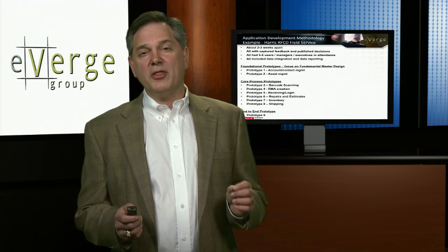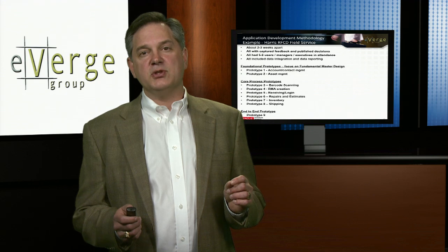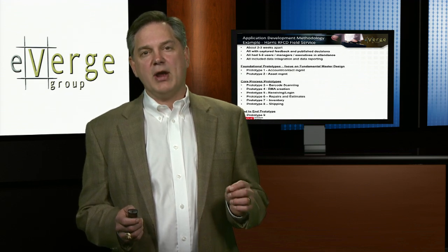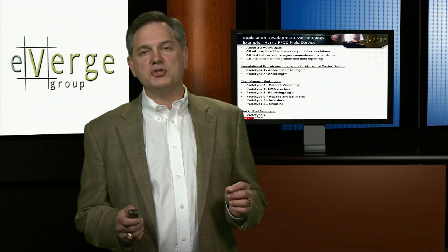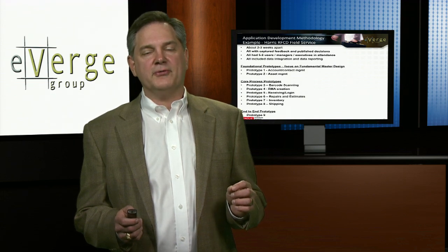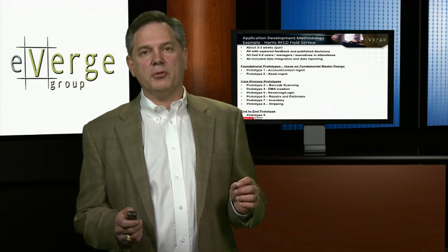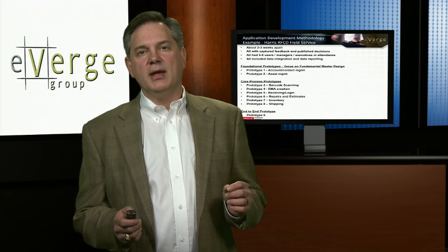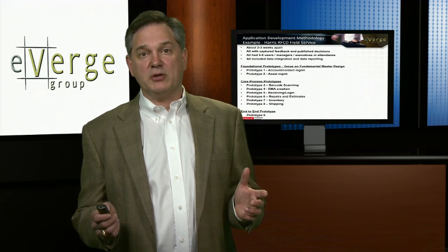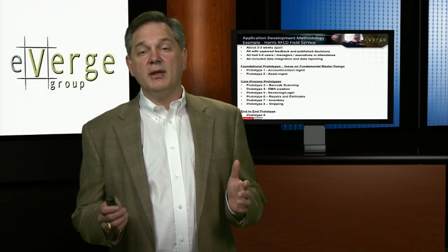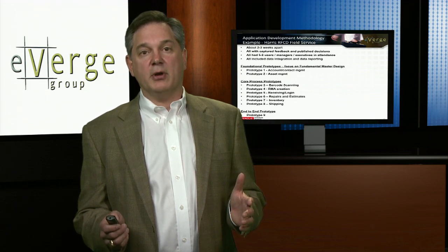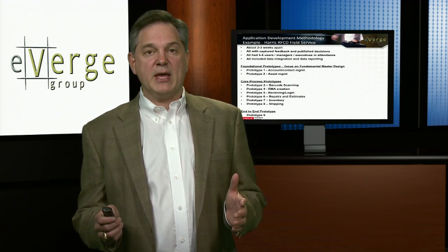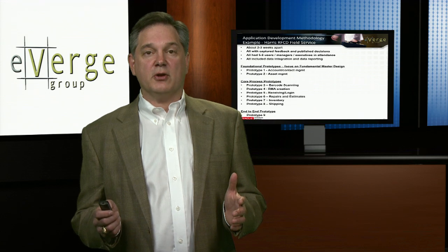Again, one of the other things that will happen is you'll find some tough nuts to crack here. In something like RMA creation, maybe there's 2 or 3 design gaps that are really difficult to fulfill the requirements with our application software. And what you may need to do there is have some special sessions where eVerge Group recommends that we have a special session on one aspect of RMA creation, and we're going to invite the same people, but we're going to focus just on these particular aspects.